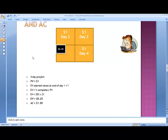So that is what earned value shows you. It shows you the value of the work performed. And that's why EV is called the budgeted cost of work performed. PV is called the budgeted cost of work scheduled. And AC is called the actual cost of work performed. So if you do the metrics for this project, you'll find out that this is a very miserable project. They're doing really, really badly.